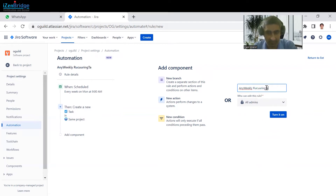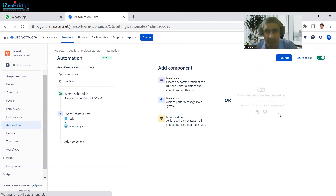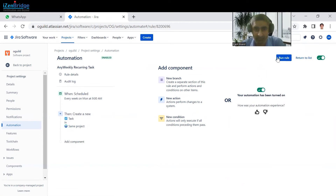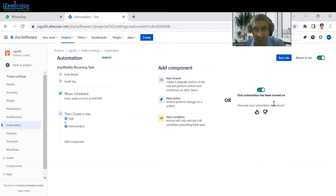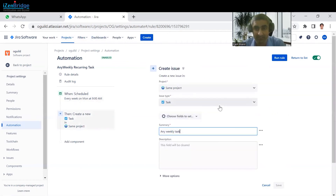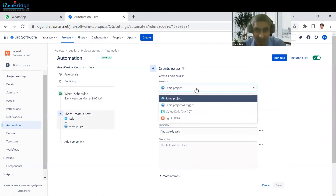Name the rule — 'any weekly recurring task' — and turn it on. Now this rule is created. Every week this rule is going to execute and create a task for us. That task would be created in the backlog. One thing is we also need to choose in which project this task is going to be created, so we have to select the project.